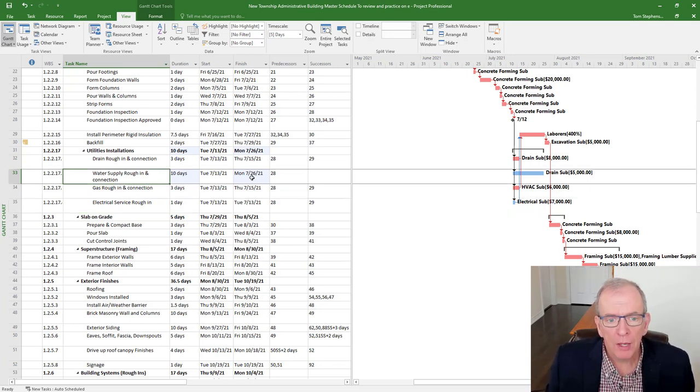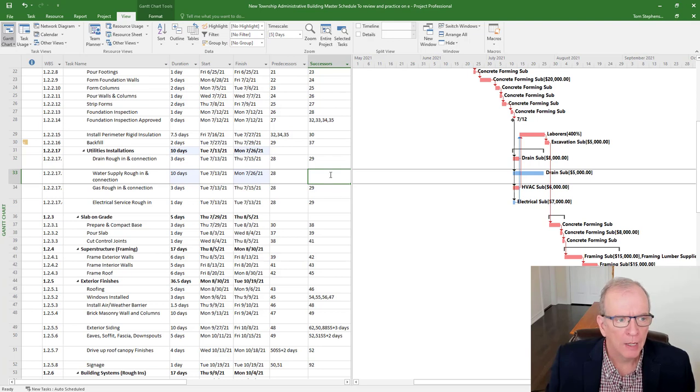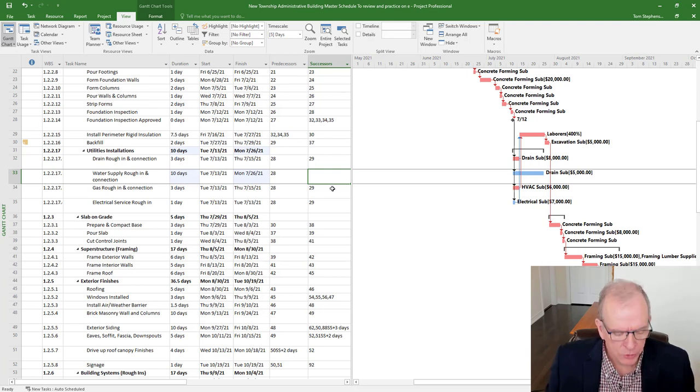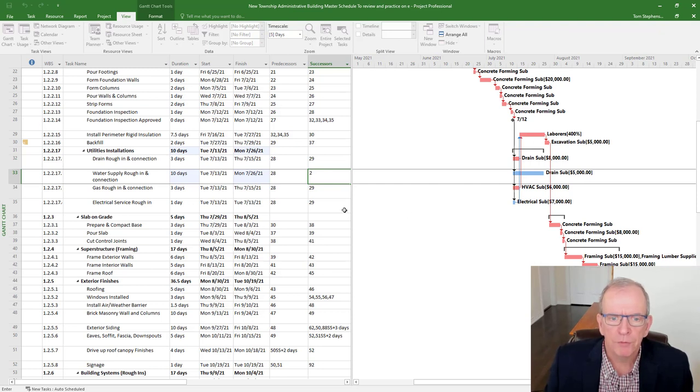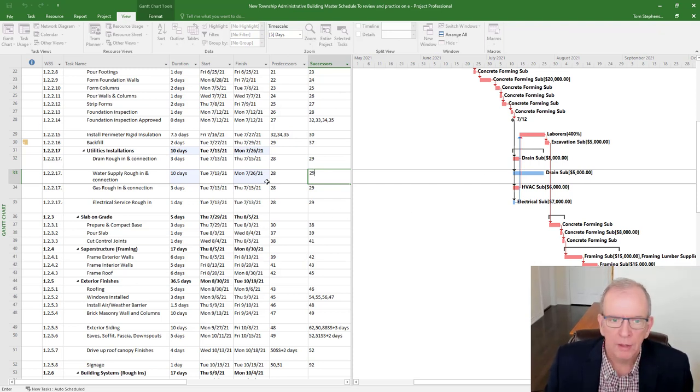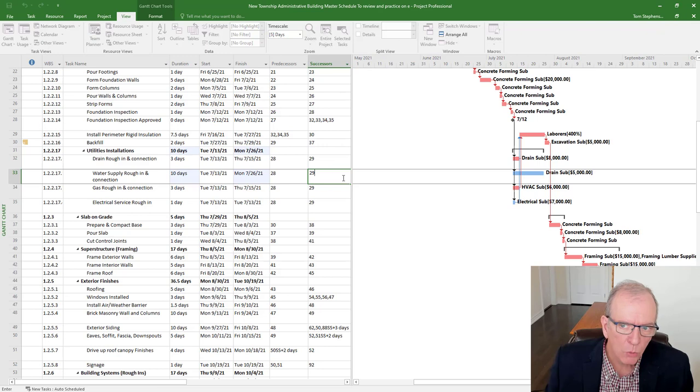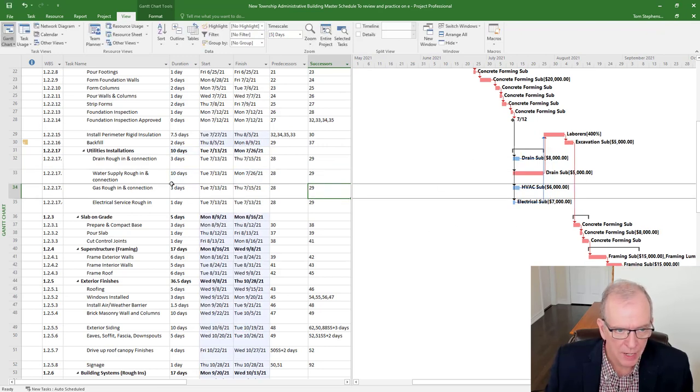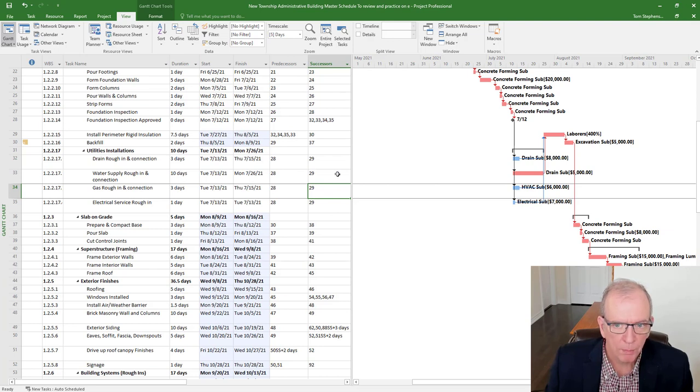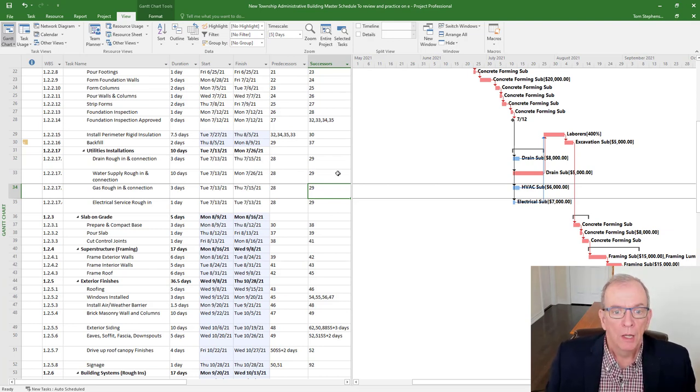Now, I do sometimes get pushback from some site supers and project managers, and they'll say, well, it doesn't need to really hook up to anything for months. I'll relink this here. Watch what happens. Pushed everything a lot. It pushed everything a lot now because now that's representing the critical path, pushing it.